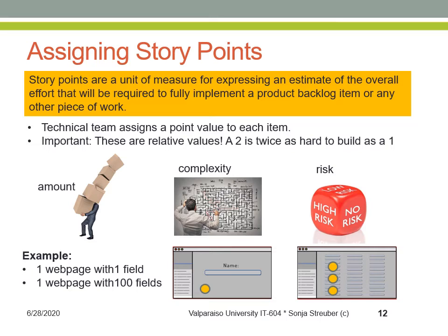This would mean that the page also requires interactions between fields. If the user enters a Visa card, a 3-digit CVV field is shown, but if the user enters an American Express card, a 4-digit CVV field is shown. Even though there are still 100 fields on this screen, these fields are much harder to implement. They're more complex. They'll take more time. So the effort just got much bigger.